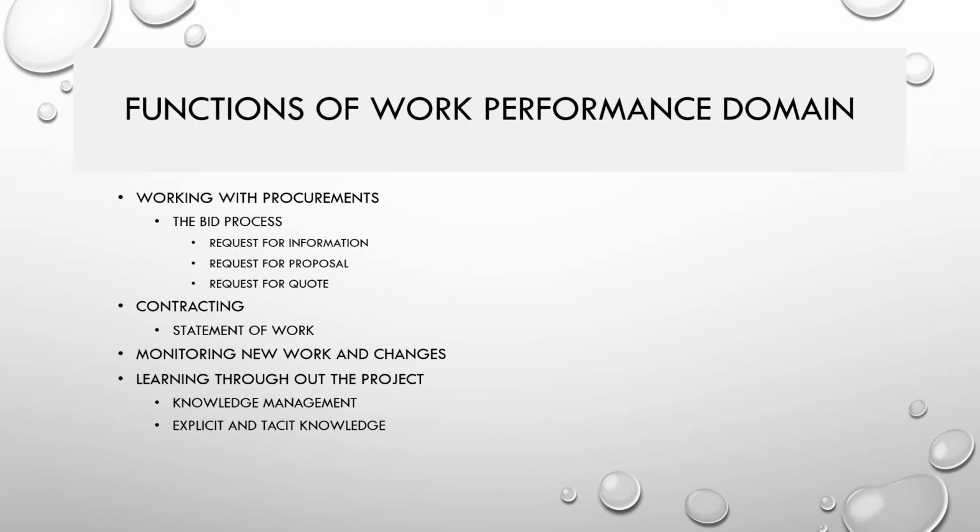The next one is working with procurement. How do you want to manage the bid process? You can go for a request for information, request for proposal, or request for quote. There are multiple ways you can do the bid process. As a project giver, as a customer, you can go for a bidder conference. You can invite